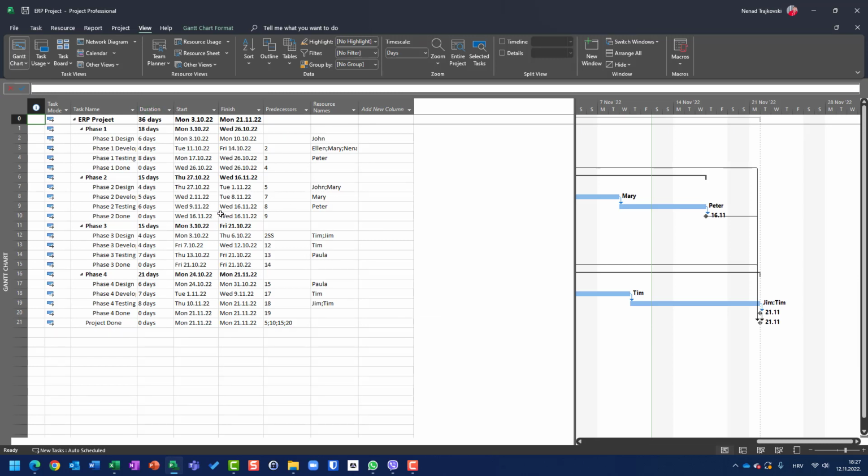You can apply, and you should apply, a table to a project from global MPT, but you should also apply a view, because if you change your table but you still have some fields in this view, it means that those fields are not in a table anymore, but still exist as independent fields in view.